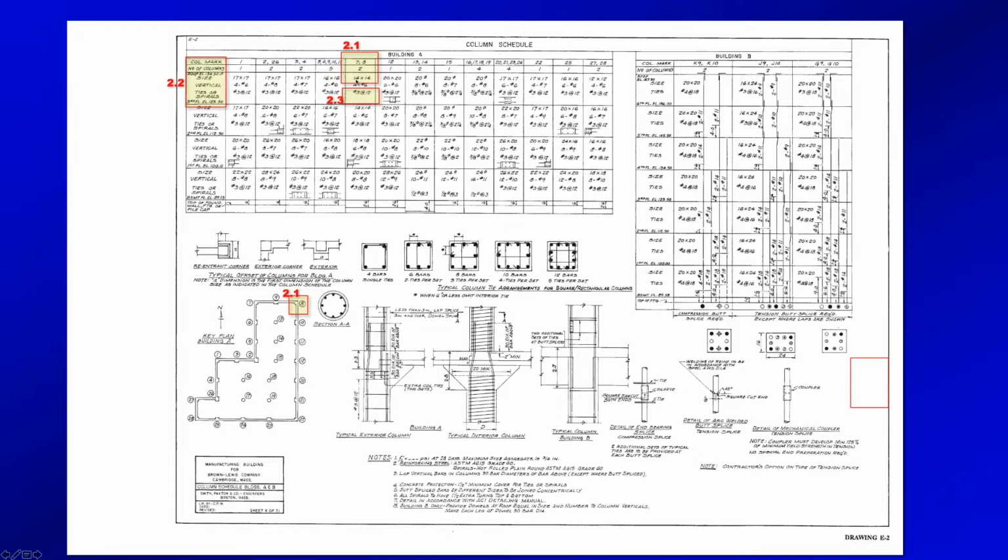What is the elevation change between the third level and the roof? Well, the way to find that is you have to come over here to the columns, and it tells you that you're in the basement, first floor, second floor, third floor, and then up here in roof. And it tells you the roof elevation is 134.5 feet, and it even has this little mark there showing the arrow up to that edge. And the top of third floor is 129.5, and if you subtract those 2 numbers, you come up with 11 feet. So the difference in that elevation is 11 feet.